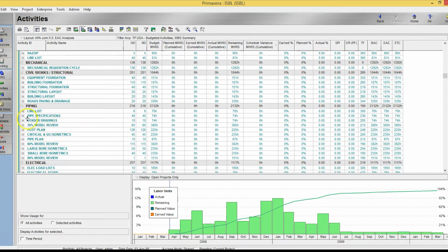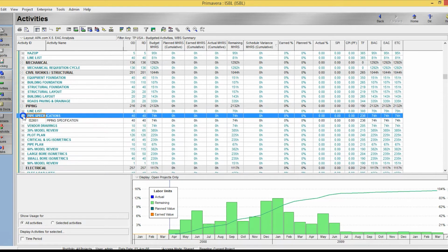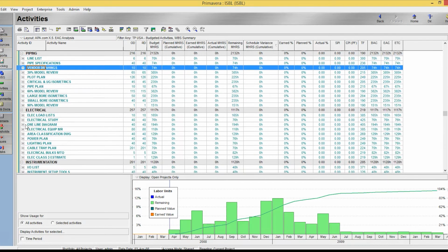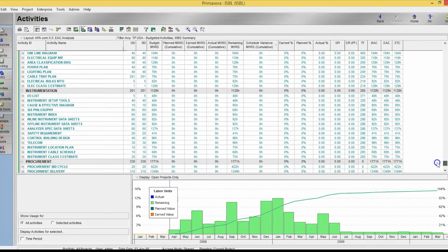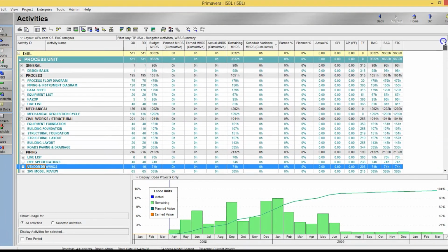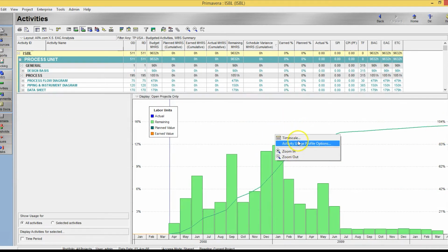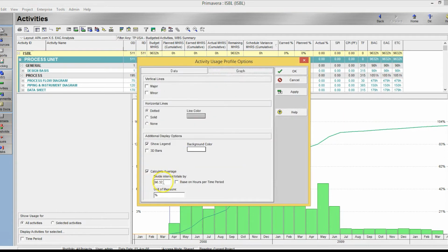But in this layout, you'll find that there is the list of deliverables and the AKA rules of credit. If it applies to that deliverable, it's emulating it in a way. So under this layout, I can actualize, I can update, and I can review my performance all in one shot. Plus, below out here, I have the usage profile.